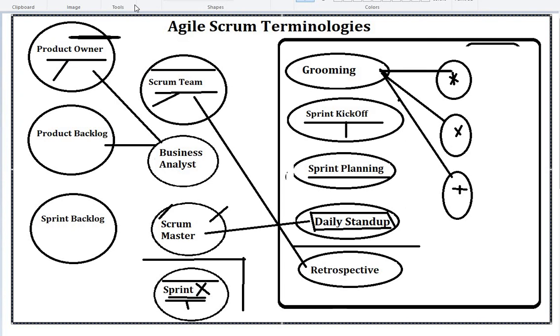The product owner may come at you at any time saying that you don't want that, and you are going to be ready to fit these requirements. Releases are usually 1 to 2 months in Agile Scrum. They are going to release either 2 sprints' worth of work or 4 sprints' worth of work. 4 sprints' worth of work is considered to be a 2 month release.